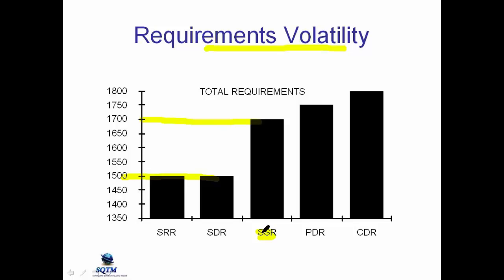And in developing the new kinds of way we do requirements, we want to document individual requirements, because we will have to keep track of the requirements to see that each of these individual requirements is uniquely tested. So we now know from this requirement spec that there are 1,700 requirements. And when we did the preliminary design review or the high-level design review, we found out more things. We need more modules. So we now understand we have 1,750. And when we did the critical design review or the detailed design review, we're now up to 1,800 individual requirements. So the requirements haven't been stable, and this is even before we coded the first word. Of course, any change in requirements after coding is even more serious than changes during high-level design and critical design.